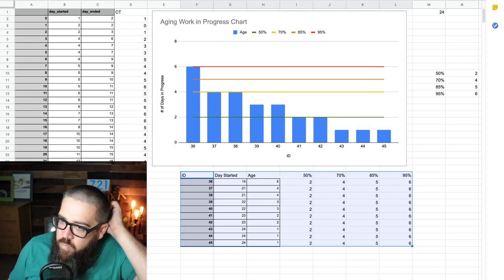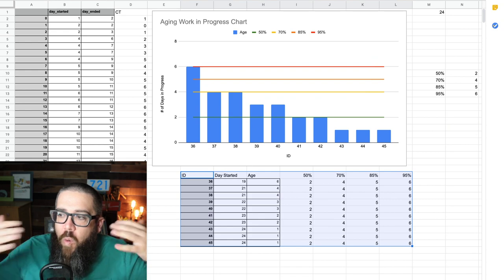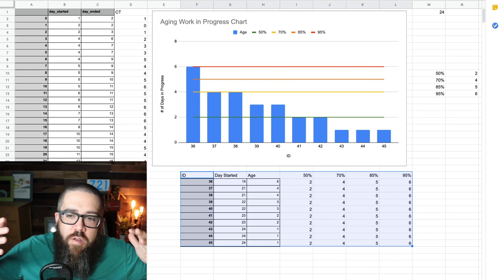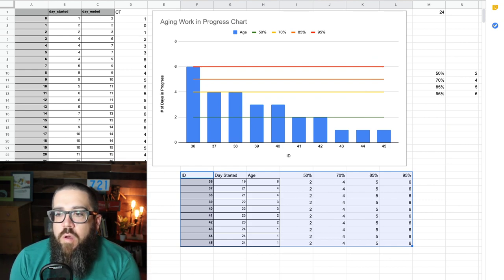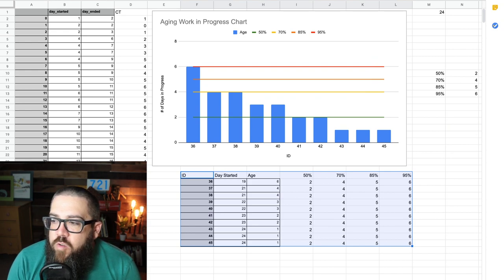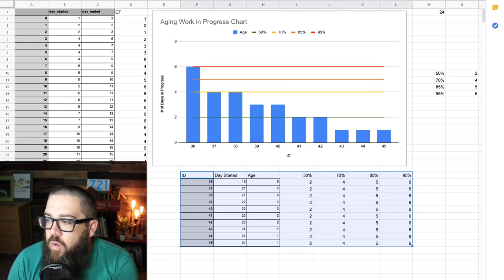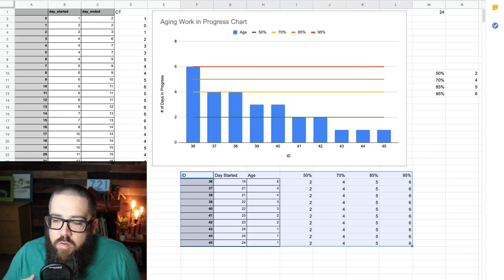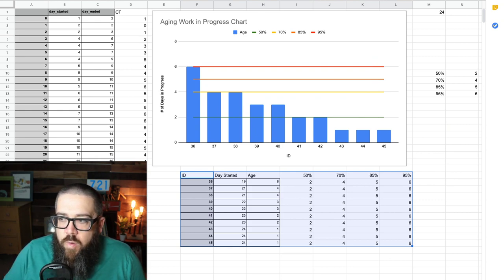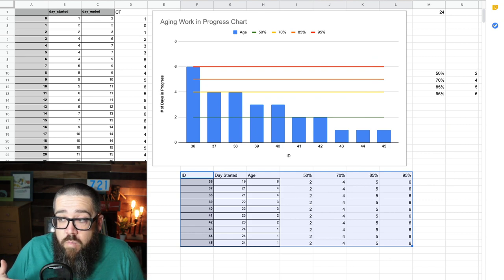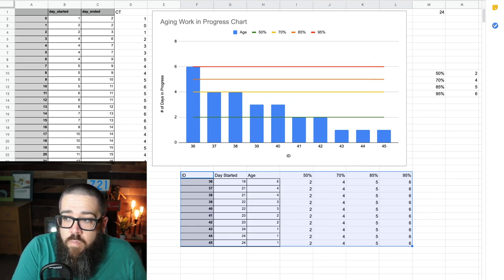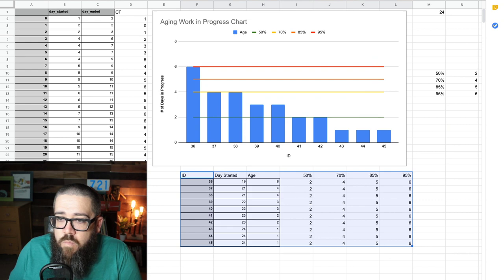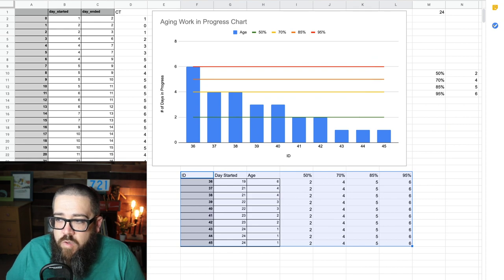This is when you're no longer in stand-up. This is when you're in stand-up, and if you're one of those teams that's asking the flow questions, what is blocked, what is old, what is new, this is old. It's old. So, if you've got the 85th percentile, it's old. It's time to break it down, stop everything, do something. Now, here's where it gets interesting. Once you cross that 50th percentile line, that's where you want to start thinking, hey, do I got this? Because, at this point, 50% of the time, once you cross that line, it's hard to tell when you're going to finish it.